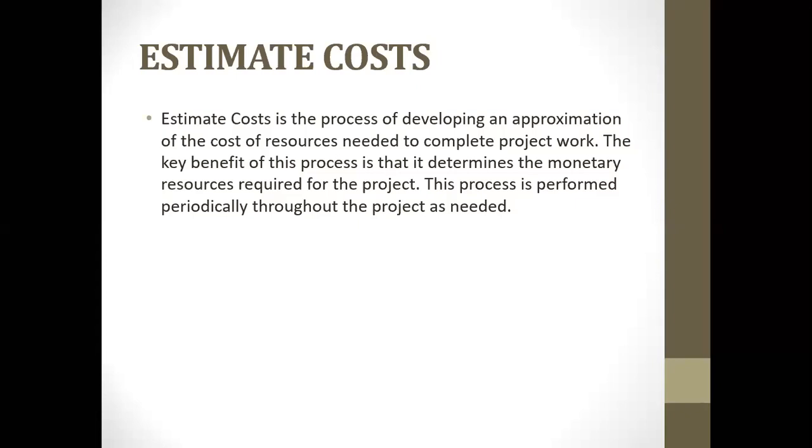Let's assume that you're a project manager handling projects that had fuel as a major resource before 2013, right? I think January 1st, 2013, was when the price of fuel rose from 65 naira to 89 naira. So let's assume you did not consider economic variations, and you were running a project from 2012 that was going to take through 2013 and probably beyond, and your cost estimate for fuel, your major component, was say 65 naira, and at the end of the day there were cost variations,